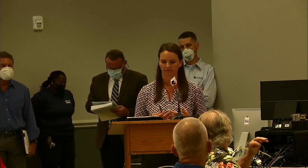I know that Hanover will try to save large oak trees along County Road 48 and Number 2 Road to help with screening. It's a great amenity for their own neighborhood, so they recognize the value in that. We will coordinate with Florida Fish and Wildlife Commission as far as any listed species go, but as of today, the environmental assessment has only identified gopher tortoise burrows on the property, so those will be relocated in accordance with those guidelines.